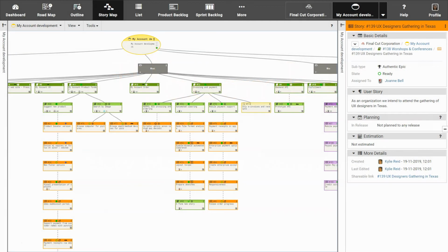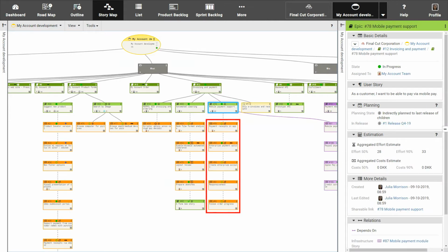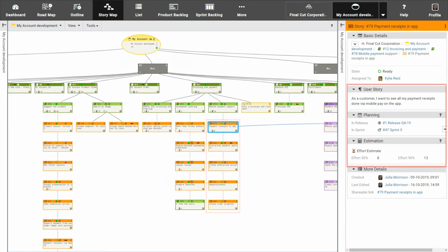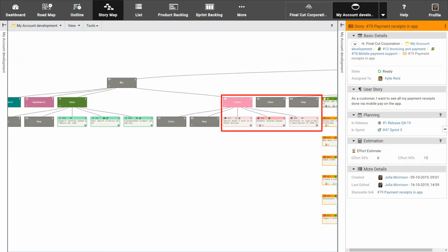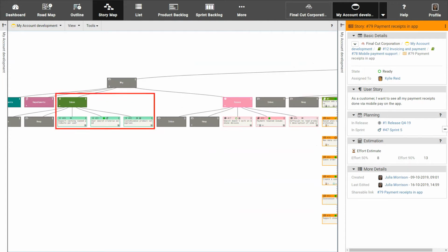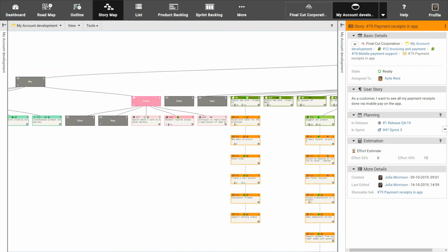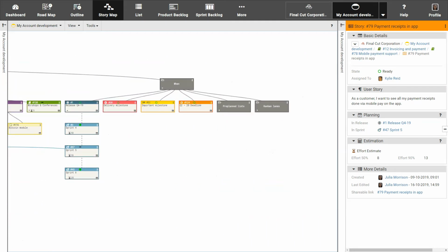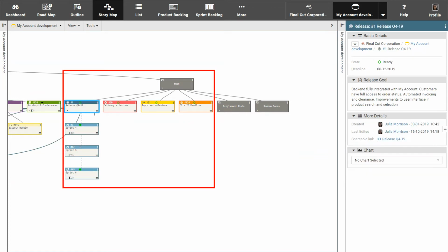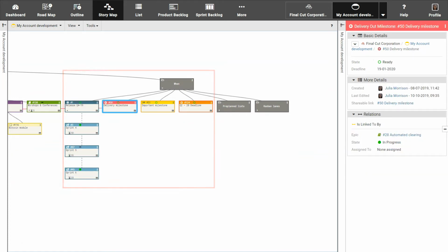The story map. Once major goals have been established in the roadmap, or when user stories have been collected, their functional ordering can be done in the story map. Broad user stories are classified as epics, which can be broken down into a set of smaller ordered stories with increased level of detail for each level. A section of the story map has been designated for including reported and identified issues and also developing ideas. This hierarchical breakdown triggers geographical recognition and thereby gives a better overview. Time constraints, such as milestones, can be mapped alongside the hierarchy of stories.